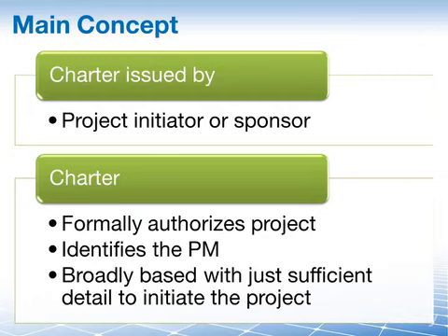And as you don't know a great deal of detail at this stage, it is a pointless exercise to delve very, very deep. If a project charter is also broad, you won't need to change it too often during the project. The real detail will be progressively elaborated in scope management.